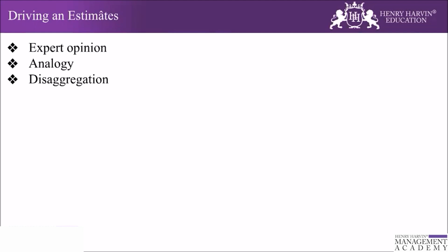To triangulate, compare the story being estimated against a couple of other stories to decide, if a story is estimated at 5 story points, whether it seems a little bigger than the story you estimated at 3, and a little smaller than the story that you estimated at 8. So what you're doing is a comparison between the two things. If for one user story we have given 3 story points, we might give another story that is a little larger than this story maybe 5 story points.